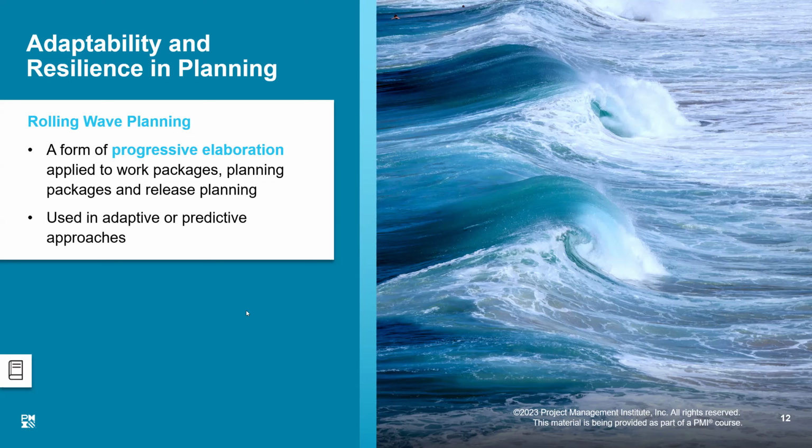At the strategic level, I say I am going to do this tunnel in five phases. The first 2 kilometers will be phase one, the second 2 kilometers will be phase two, and so on. Because I may be very clear through my analysis that the first 2 kilometers is this kind of rock, and we will do things like this, I plan my first phase in quite a bit of detail. I know what to do in the second phase, but I do not elaborate it now. I leave that plan to be refined after phase one has finished, new data has arrived, and we have learned new lessons. Based on that, I will create a detailed plan for phase two after phase one has been completed. That is called progressive elaboration, where I am elaborating my plan on a phase-by-phase basis.